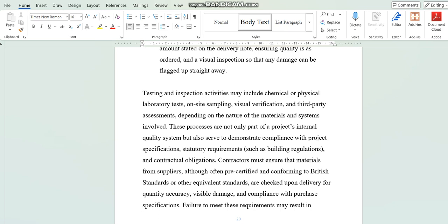Of course, you can't call for testing of every single thing. So normally, like I said, under the material category or certain machineries category or certain systems, they would just ask them for testing according to certain standards or according to certain requirements. It could be project requirements, it could be specification, it could be certain standards. And when they come, it's based on inspection.